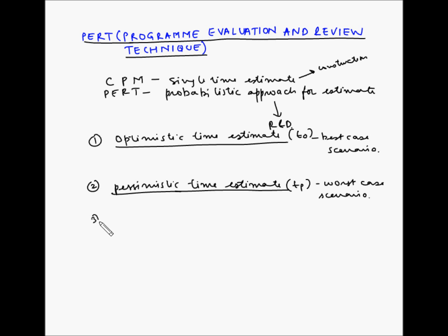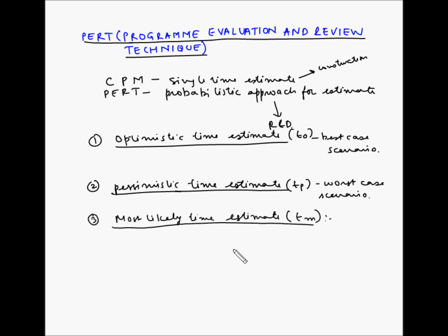The third estimate is the most likely time estimate, also denoted as TM. This is the time estimate that has the highest probability of occurrence. It takes into consideration the productivity of the likely resources to be assigned to the project or activities, as well as the regular interruptions that can happen to complete the activities.